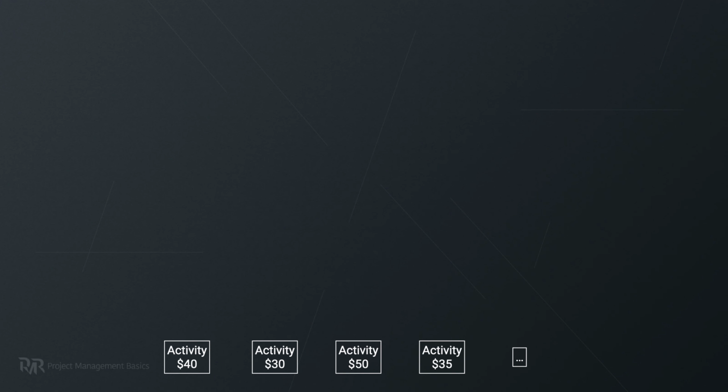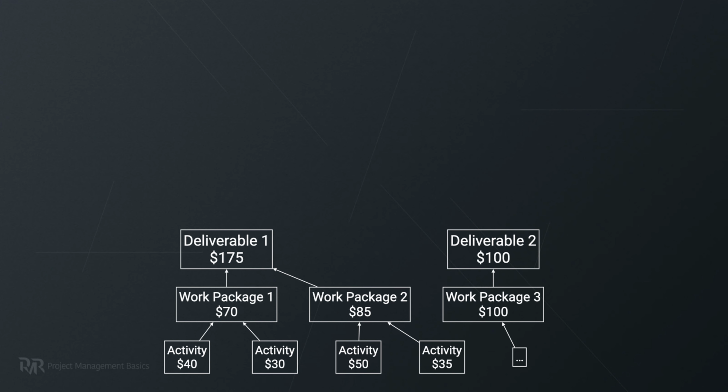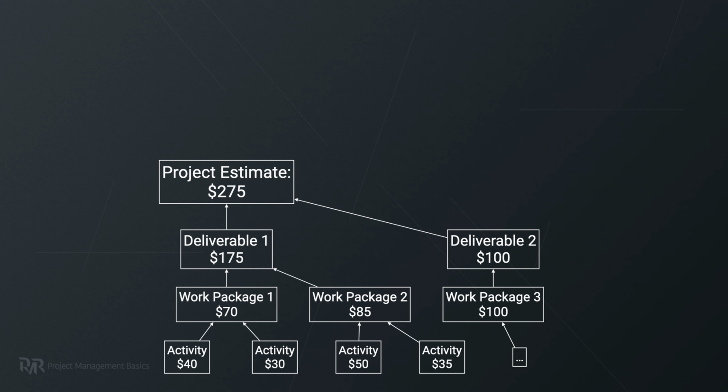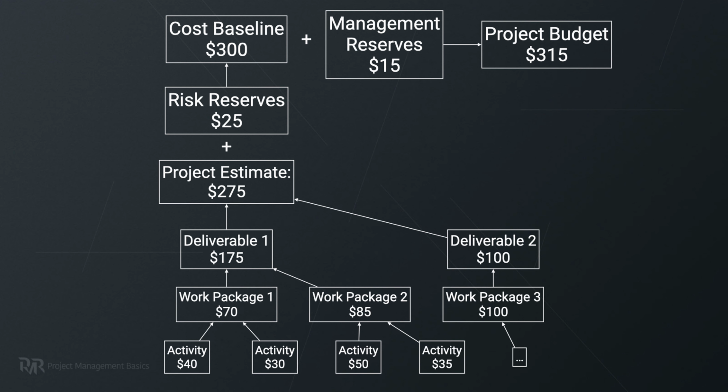After that, you sum up all these estimates to the work packages level and then to the deliverables level, and this way you get the most accurate estimate for your project because you actually estimated the simplest tasks that don't have much ambiguity in them.